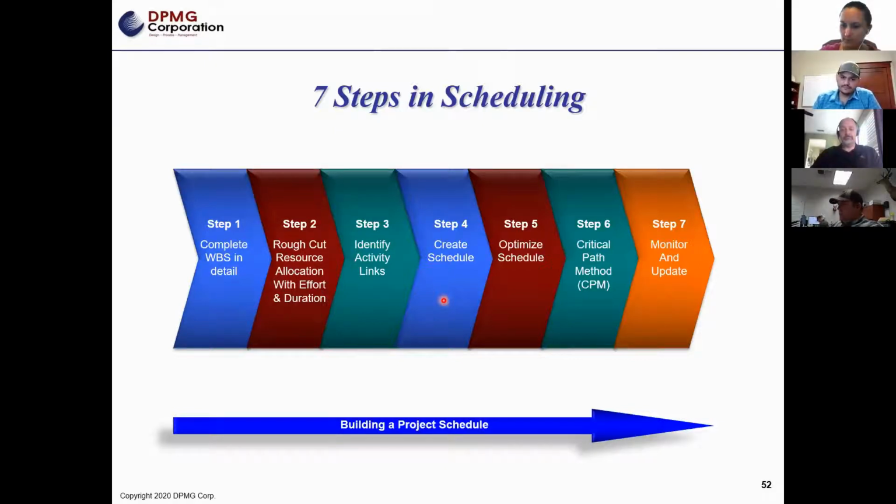The most common piece of software out there for project management is Microsoft Project. And when you turn Microsoft Project on, it takes you automatically to the Gantt chart, which is the timeline schedule. It has the ability to do steps 1, 2, and 3, but it takes you directly to that. And without proper training, people miss steps 1, 2, and 3 because they're so focused on trying to create a nice picture Gantt chart, a nice waterfall schedule. And we miss those others.